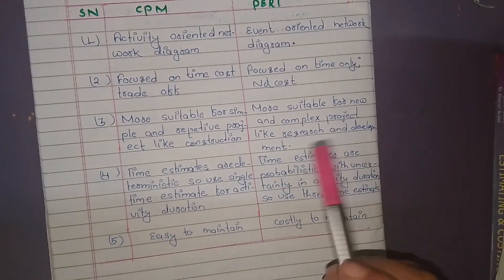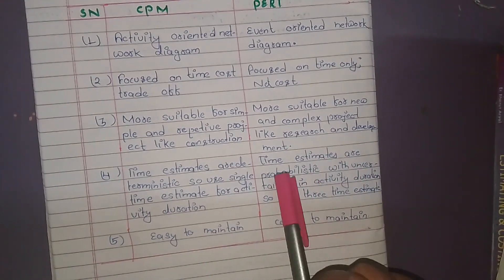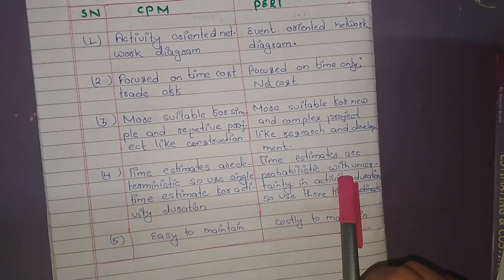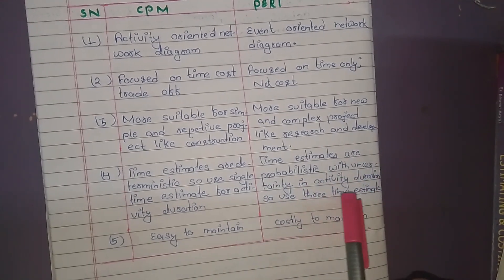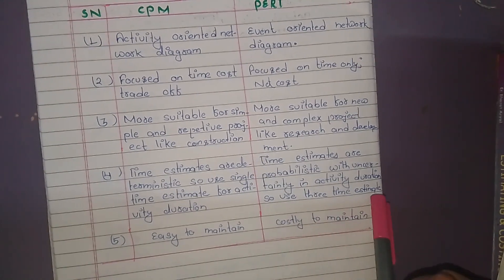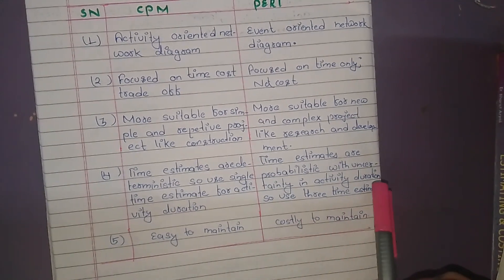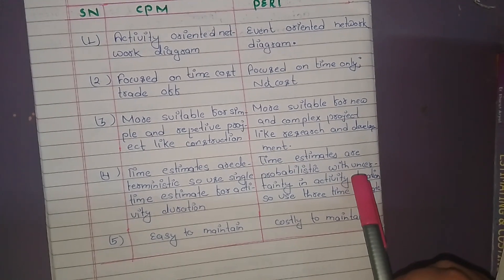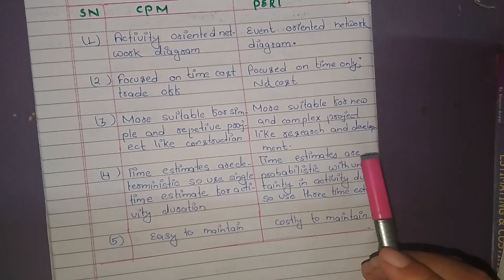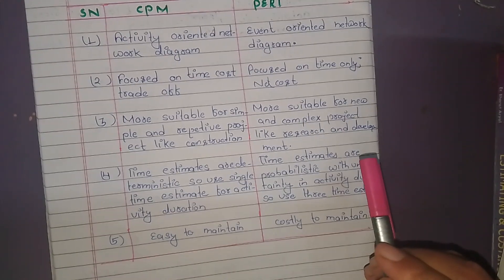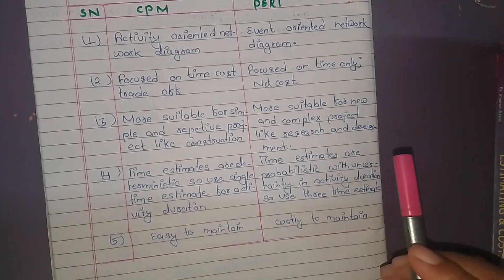In PERT, Time Estimates are Probabilistic with Uncertainty in Activity Duration, so 3 Time Estimates are used. Those 3 Time Estimates are: 1) Optimistic Time Estimate, 2) Pessimistic Time Estimate, and 3) Most Likely or Probable Time Estimate.